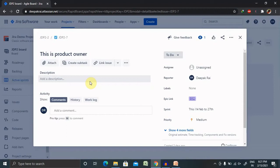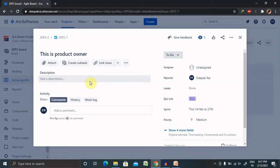The development team will create their implementation, the testing team will test it, and the UAT team will certify that it is working according to the requirement. So these are the three steps we can see. It might differ with project to project and functionality to functionality. So subtask is dividing one feature or functionality into different groups so that each team can pick it up and work according to their assignment.